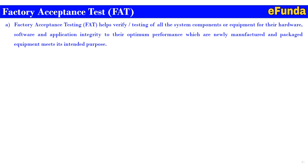Factory acceptance test (FAT). Factory acceptance testing helps to verify and test all system components or equipment for their hardware, software and application integrity to their optimum performance, by which the newly manufactured and packaged equipment meets the intended purpose. The FAT validates the operation of the equipment and makes sure that the customer purchase order specification and all requirements have been met.